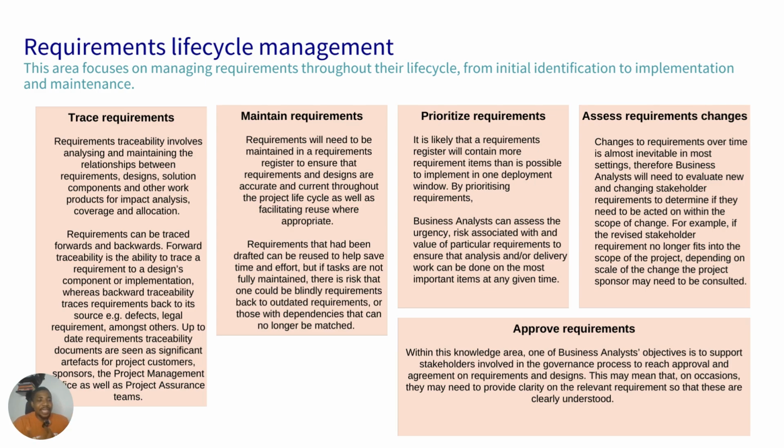You're going to then create test cases that will help you trace your requirement back to your solution. So, did we actually have a feature where I can sign in with Google on the solution? If yes, you've been able to trace that requirement, right? So you can trace backwards and you can trace forward.